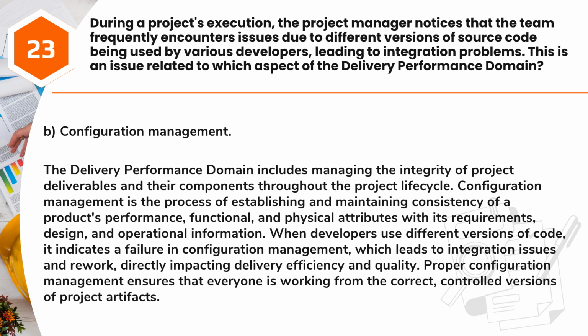Answer: B. Configuration management. The delivery performance domain includes managing the integrity of project deliverables and their components throughout the project lifecycle. Configuration management is the process of establishing and maintaining consistency of a product's performance, functional, and physical attributes with its requirements, design, and operational information. When developers use different versions of code, it indicates a failure in configuration management, which leads to integration issues and rework, directly impacting delivery efficiency and quality. Proper configuration management ensures that everyone is working from the correct, controlled versions of project artifacts.